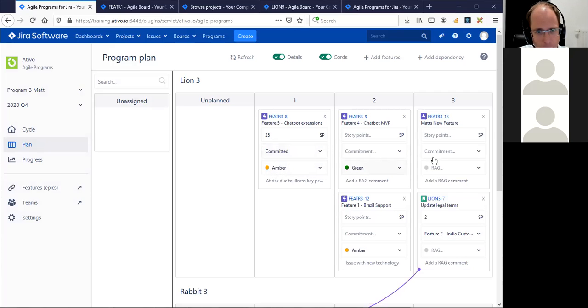And then under it, you see a red, amber, green level. That's something that the team members will use very often after the PI, to say, okay, this feature is still going well, it's green, or no, there's a major risk, or there's already an impediment or an issue, we give it an amber color, or it's blocked and it needs attention from other teams, red. So that's what we use here. During the PI session, it's also already possible and common to tag some features as amber. The team can say, okay, this feature, we plan it in, we've estimated it in, and we can commit to it or not,